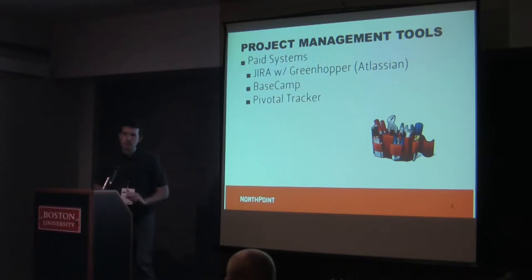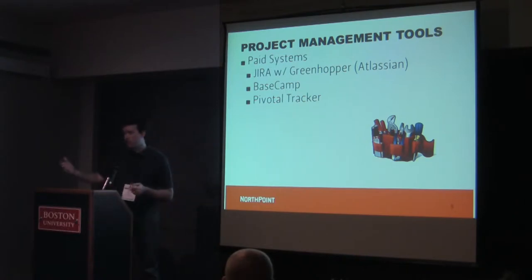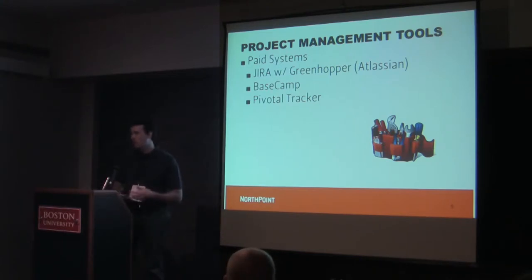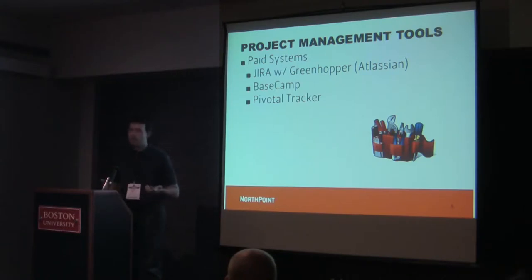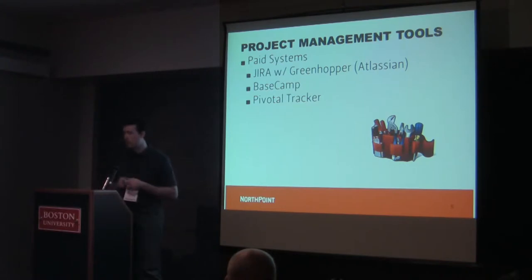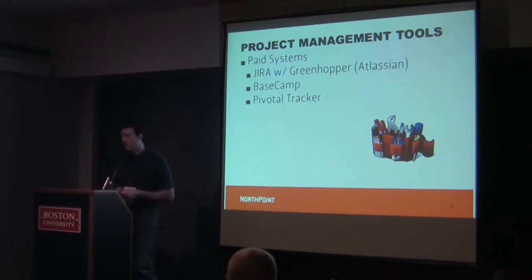Basecamp is another one. Jira was good for creating tasks and stories — it was originally an issue or bug tracking system — but communication was a little difficult. Basecamp allows us to basically get rid of email and provides a web-based tool for communication, document storage. You can upload a document, have a communication thread about it, and do searches. It's a really good tool, though it is paid. Pivotal Tracker is a similar tool at a lower cost, more geared towards Agile and Scrum. These are the ones we've used and know work well.